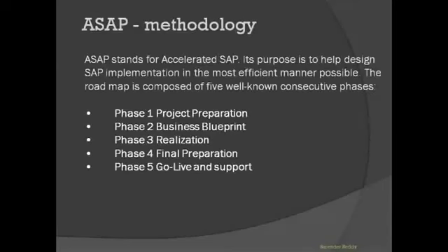And I think SAP implementation is based on the SAP methodology, 5 phases are there. Scoping activity, then project preparation, business blueprint, realization, customization, final preparation. Final preparation involves testing, training of the end user, then go live. All these phases involve different documents: project preparation documents and business blueprint, BBP. In realization, we are having customization documents, training documents, testing documents.